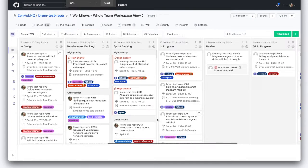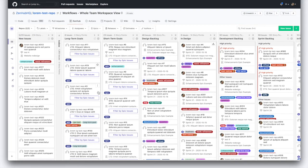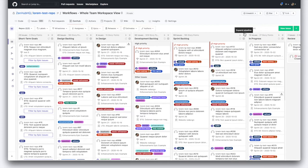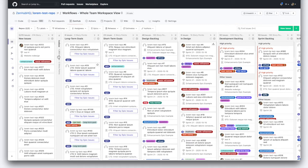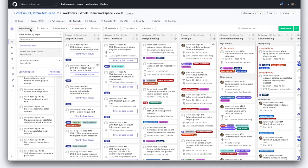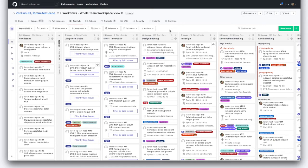Let's use our browser to zoom out and see more of the board, and expand some of these columns. You'll notice there are a lot more issues here. What Zenhub allows you to do is combine multiple GitHub repositories together into a workspace. So this is not just a board — this is a workspace that allows you to group multiple repositories together with a specific workflow. It allows you to see the whole picture, where a GitHub project only lets you see one repo at a time. And if your team works the way a lot of teams work, you probably have a bunch of GitHub repositories — so that's a key difference between Zenhub and GitHub.